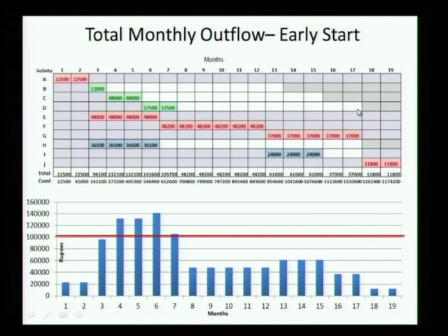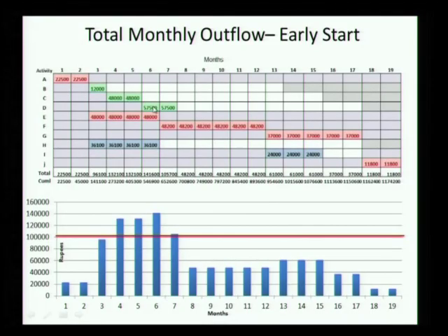Then for each of those 10 shifts, I can move this independently, this independently. So that is the solution space we are talking about. It's going to be very large, and the ultimate decision variable is how much I should move each activity by.